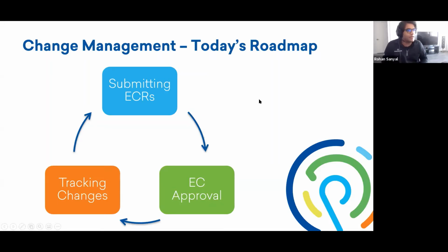Now, the way I'm going to handle the actual engineering change is that we start out with an ECR, which is an engineering change request. We look at the request and see whether it is worth our time to actually make the change. Once that is approved, it can become an ECN, and the changes can actually be applied to the part or assembly or what have you. All right.